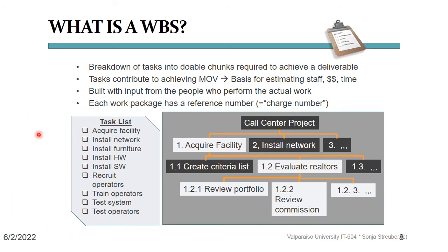First, you will find on your list what is called high-level tasks, meaning basic ideas of what needs to happen to take your product live, like in our example, setting up a new call center in a new city. These might even still be the milestones from the previous planned scope management process. Most likely, these basic ideas from your list can be broken down into smaller and smaller work tasks that one person eventually can complete in 1 or more days.